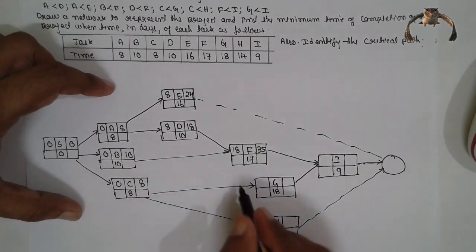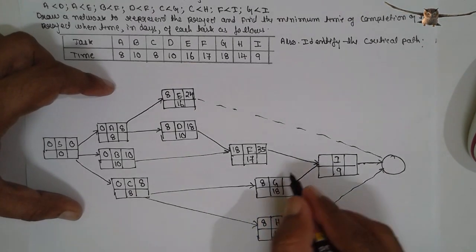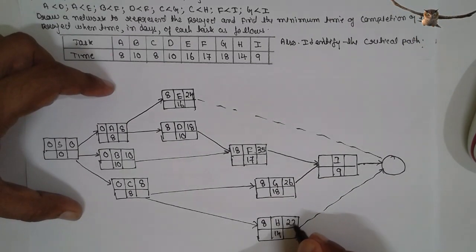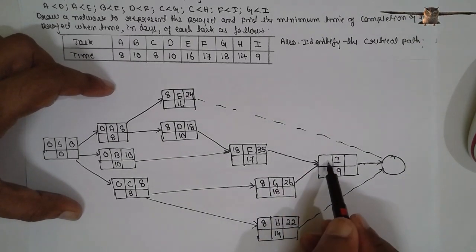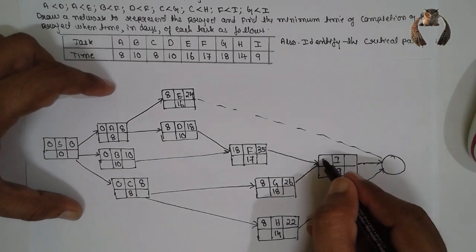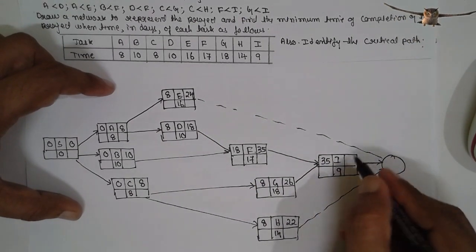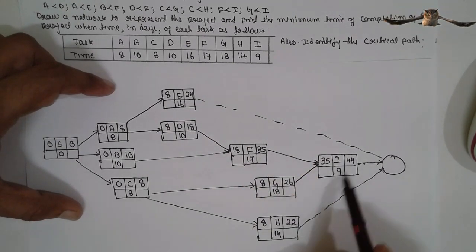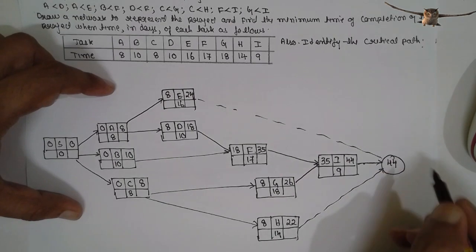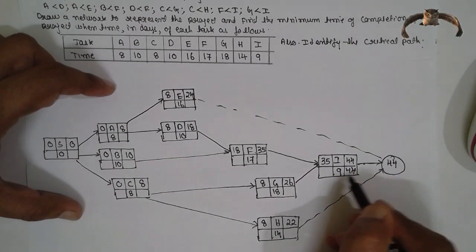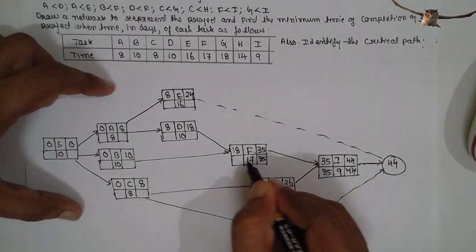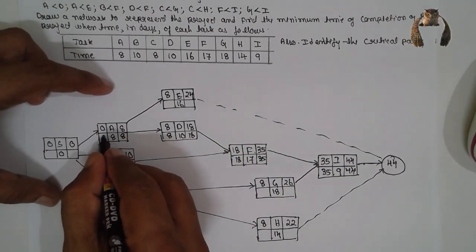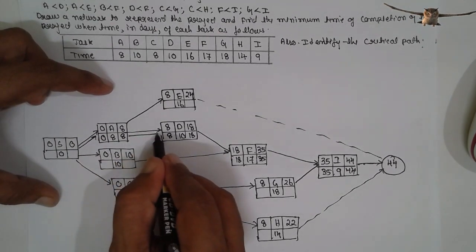At the finish line, write the larger value: 35+9=44. Other paths give 24 and 22, so 44 is the largest — write 44 at finish. Now going backward from 44: 44 is at finish, it becomes 35. 35 minus 17 = 18. Write 18. 18 minus 10 = 8. Write 8. 8 minus 8 = 0. This is your critical path.